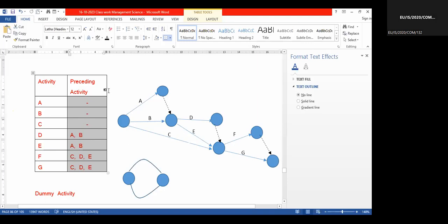All the connections and dependencies show that the sequence, parallel activities, everything has to be connected properly. You see activities A, B, C have no preceding activities or pre-activity. Therefore, we start with one circle, that is the tail event. All are starting from one point.